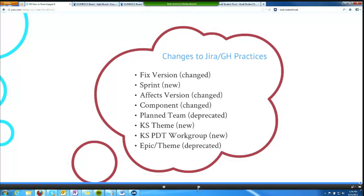We are changing how we use certain fields. Fixed version was the field we used previously to indicate what sprint or milestone a particular ticket was completed in. Since sprint is now a completely separate concept in Greenhopper, we're now using fixed version to reflect the milestone or the version of our product in which we plan to undertake a body of work.